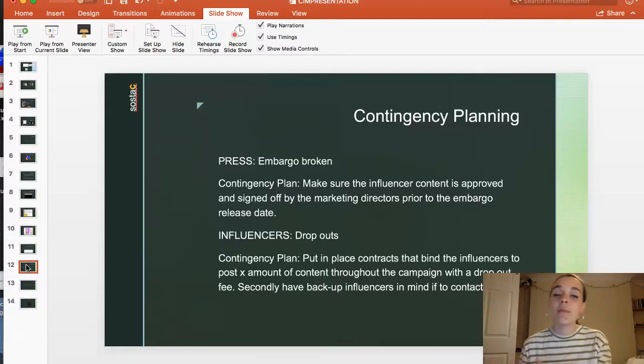Another one, people, a connected stakeholder being an influencer. They are human, they may decide actually they don't want to do it anymore. To avoid this happening, we're going to put them in a contract that binds the influencers to post X amount of content throughout the campaign with a dropout fee. Secondly, just in case they still drop out, we'll have backup influencers in mind to contact if they do.